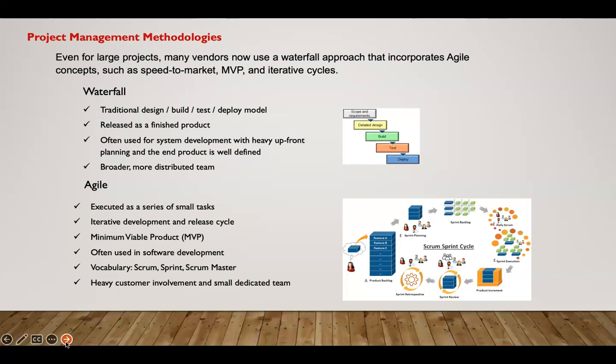Although in waterfall as well, the focus is on what they call stage gates, or some people call it phase gates. What they're trying to describe is that at the end of each phase, we will have a gate with a padlock. If we've said we're going to do 5 things, they might set a threshold of 80% achievement before they can open the gate and go to the next phase. So you can say, okay, we are testing, we are checking, have we done all these? Are they okay? Up to 80%, then the remaining 20%, we can manage that. Then we open that gate and move to the next stage.